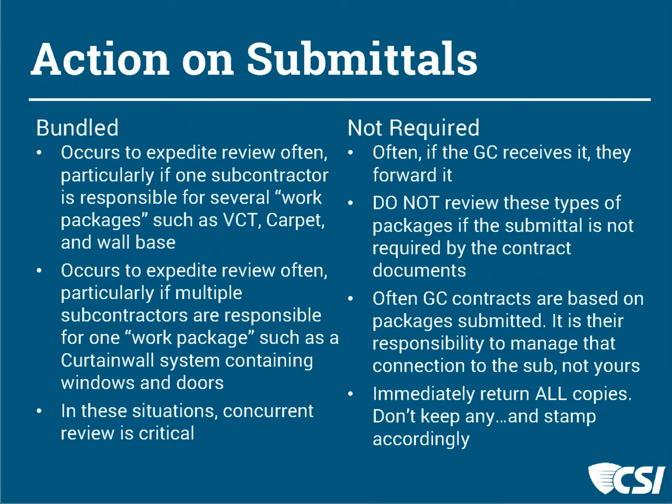So your structural engineer may have had some wind calculations. Curtain walls may require integral structural components that aren't necessarily a part of the curtain wall system. So we've got some concurrent reviews where we need to see these products together. I try to spell those out and say, these are opportunities for you to bundle things and get them processed expeditiously.